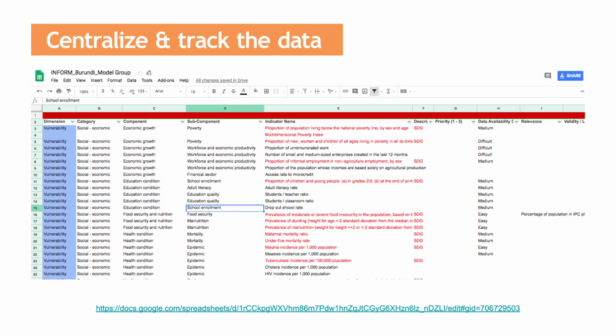Step 8. Centralize the data into a shared file. Following the field mission, the project manager vets and centralizes all data into a shared file for analysis. Create a public shared file and invite partners to contribute directly to the folder. Make your email available and centralize whatever comes into your inbox. In this phase, you may have to conduct multiple in-person and remote follow-up meetings with partners. The local process lead may have to conduct multiple follow-up efforts also to get the data.